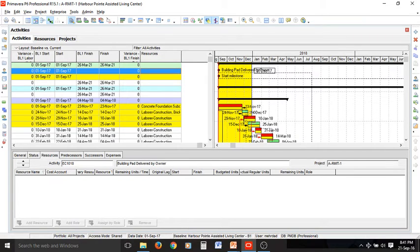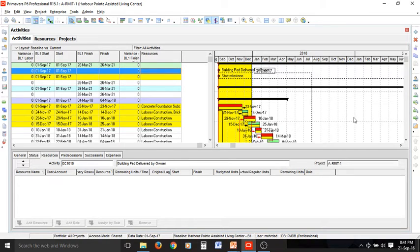Those activities falling entirely in the yellow zone have been started and already finished. Those on the right-hand side haven't been started and obviously haven't been finished. We have a few activities in the middle that are caught by this data date, so they have been started but not finished yet.